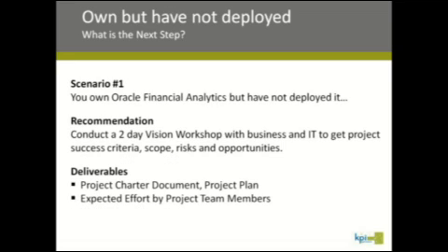Okay. If you already own Oracle Financial Analytics but have not deployed it, what we recommend is a 2-day vision workshop with business and IT to get project success criteria, scope, risk, and opportunities. And the deliverables out of that are a project charter document, a project plan, and then also an expected effort by the project team members, not just KPI, but often, very importantly, the client team.